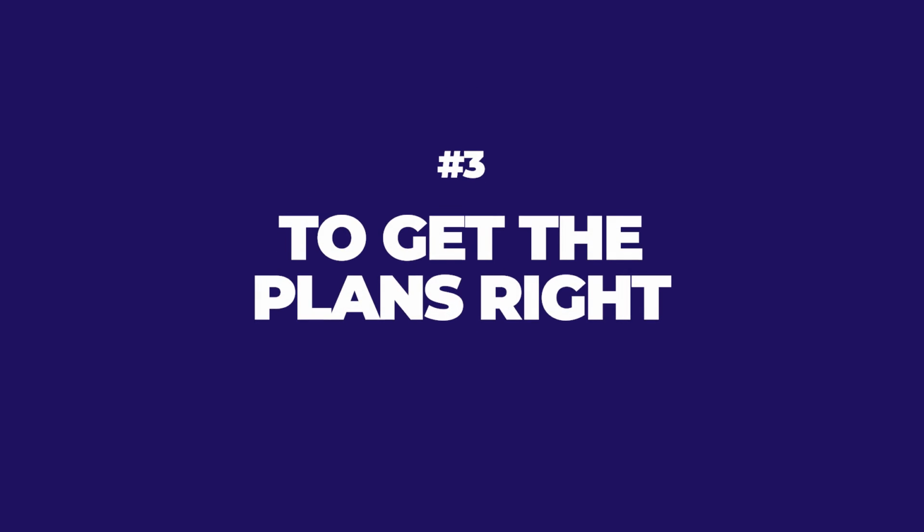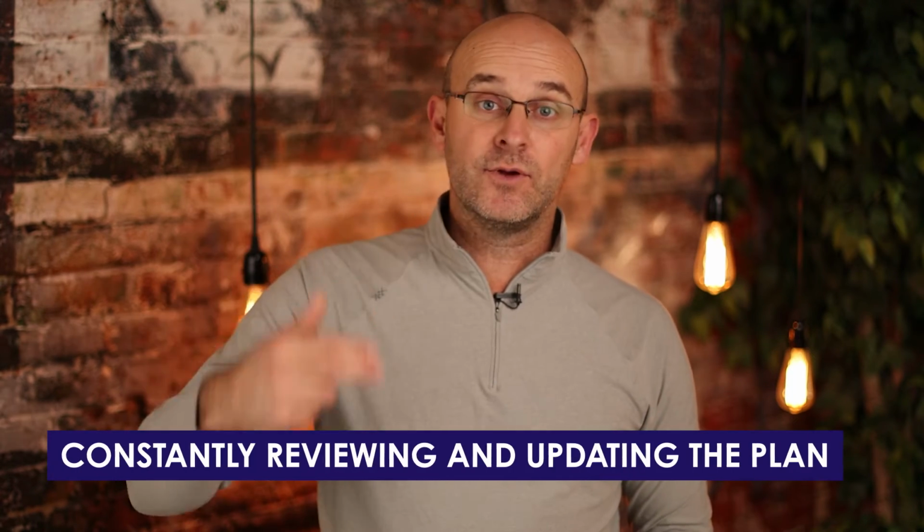And number 3, the reason for planning is to get the plans right. Let me talk about this a little bit in detail. Like I've said in other videos, you are going to create your plan in pre-construction. You're going to do it with the builders. You're going to do it with your trade partners if you possibly can, right? Early trade partners with Design Assist. And you're going to make a plan with the builders that really is hopefully the 2nd, 3rd, 4th, or 5th iteration of that plan, because you're constantly reviewing it and updating it.